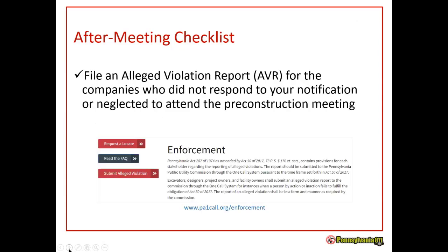And here's another thing. Just before I get into this, when you're at the meeting, if you've looked at your meeting responses and some of your facility owners didn't respond correctly, so they didn't put clear or will attend meeting, they might have put field marked. Well, if they put field marked, they still need to come back and respond with a final response, which is 099, that they did attend the meeting. So you might talk about that with them if there's any responses that were not, I guess, final. And if a liaison's there, then they'll be there to assist with that type of information.